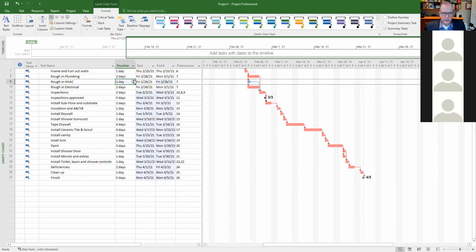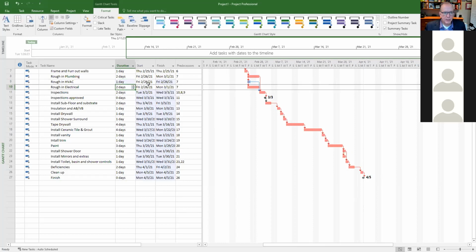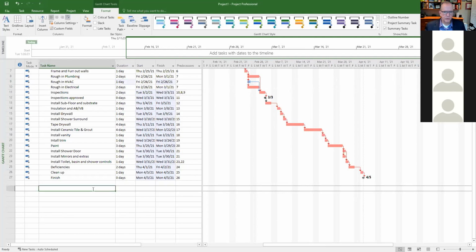We're talking about cost control in this course. You can experiment. You can do what we call a sensitivity analysis. How sensitive is this activity to change? What happens when it does? And not only that, when you do that, you can see some of the impacts on the overall project, and you can see impacts on variable costs if you've loaded variable costs on the schedule.